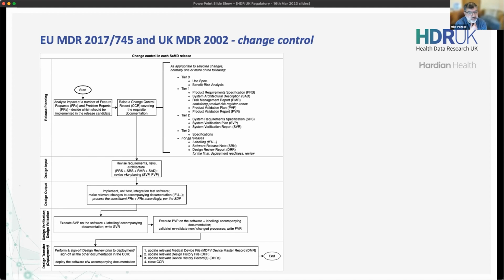And this is why we've introduced a language of tier 0, tier 1, tier 2, tier 3 changes, where if I go from the bottom upwards, tier 3 is things, small changes to the platform that you can't really see in the behavior.